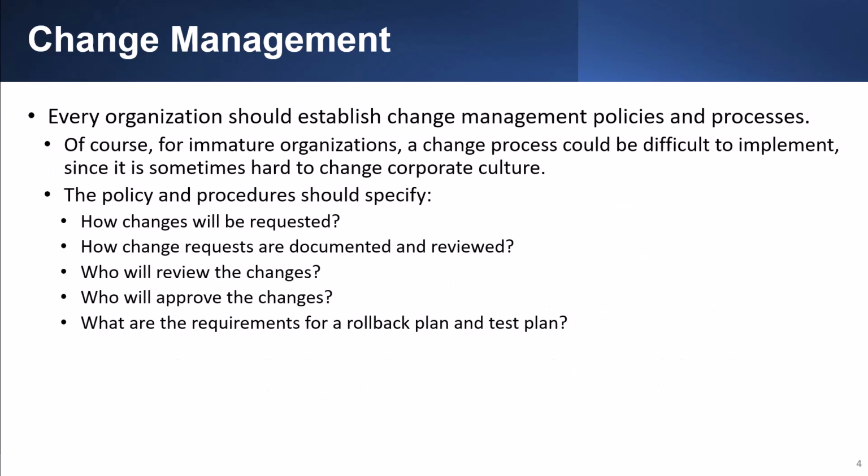Every organization should establish change management policies and processes. Of course, for immature organizations, a change process can be difficult to implement since it's sometimes hard to change corporate culture. The policy and procedures should specify how changes will be requested, how change requests are documented and reviewed, who will review the changes, who will approve the changes, and what the requirements are for a rollback plan and test plan.